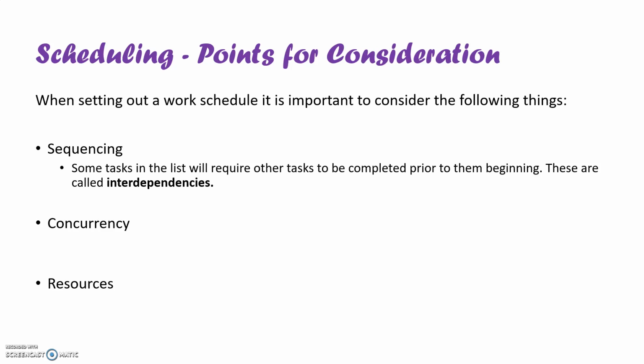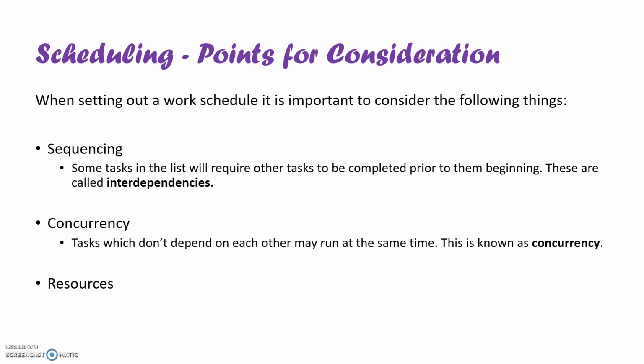And then we continue with the design stage. That's called an interdependency between different tasks. We can also do concurrent tasks. So for example, sometimes you can do two tasks at the same time. You might be creating a database to work with your project at the same time as maybe drawing some of the images you're going to use for a game. Okay, so concurrent tasks can happen at the same time.